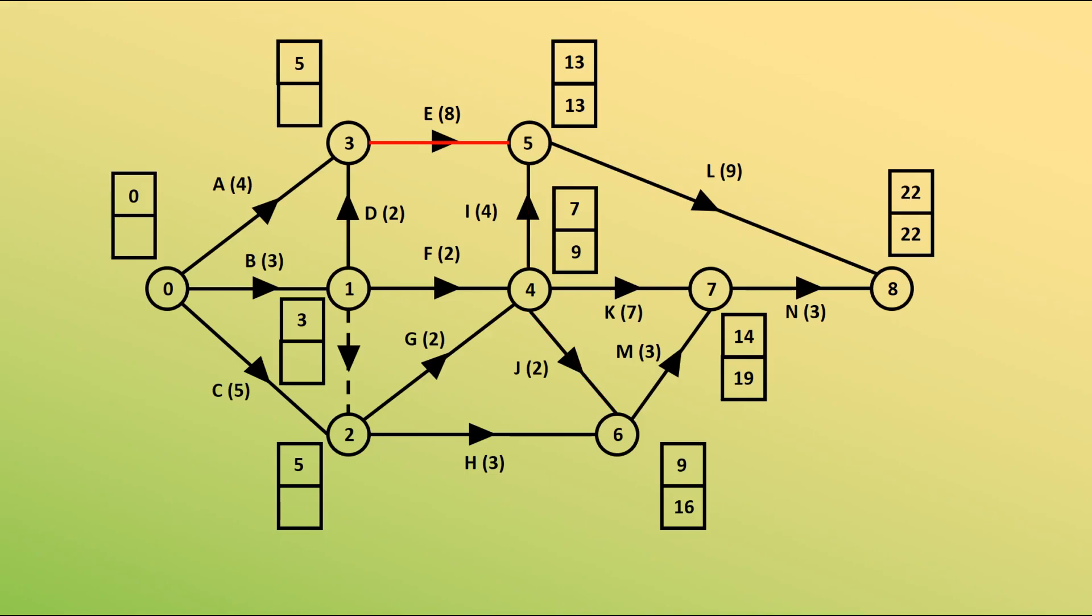Node 3 has just 1 coming out of it. We need to get to node 5 at 13, so 13 minus 8 is simply 5. Node 2 has 2 coming out of it, g and h. Looking at the late event time for node 4, 9 take away the duration of g, which is 2, giving us 7. And looking at h, we've got 16, which is the late event time for node 6. 16 take away 3 is 13. We want the smallest value. Node 1 has 3 coming out of it. 5 take away 2 for d, giving us 3. 9 take away 2 is 7 for f. And 7 take away 0 for the dummy, which is going to give us 7. We want the lower one.